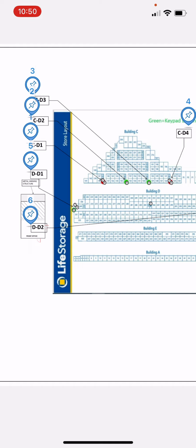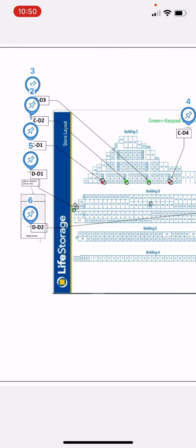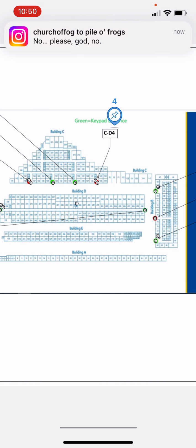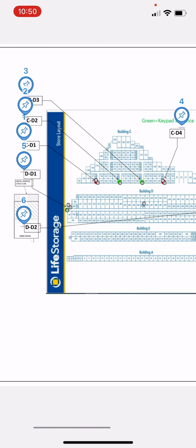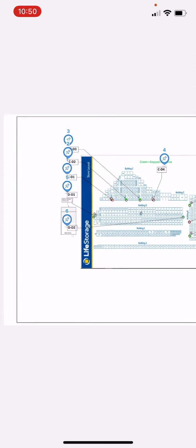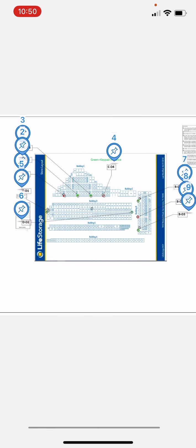All right. However, these punch list items are different. If you take all of them and add them all up together, they make our scope of work for the entire project. So I believe this project has 60 or so of these punch list items, and we drop them onto the drawings pages so that they're easily accessible in the field.